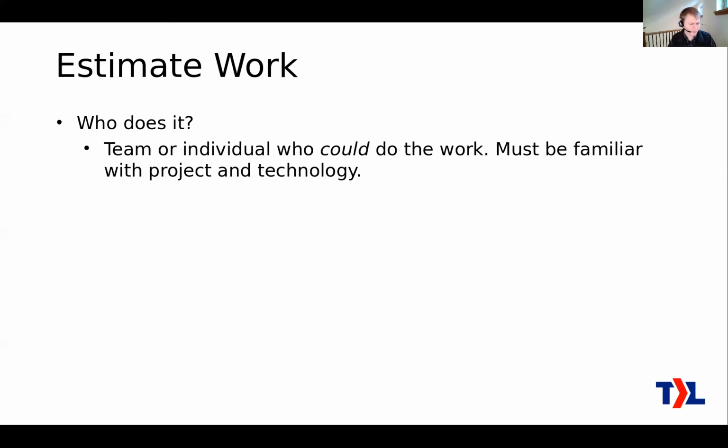Now, if the same people do it as the people who did the breakdown, why would it be separate? Just because it delays the estimation until after, hopefully, all the scope changes are done. If you estimate things during the breakdown stage, it could turn out that you need to change those estimates later, because you're going to be doing some work, and maybe that work informs the later work, and you'll see, okay, based on what we've already done, now we need to come back and make some changes here.